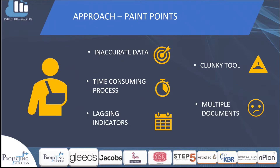Some of the pain points identified: Inaccurate data — without defined structures and closely managed fields, data is at risk of inaccuracy. Time-consuming process — manual line-by-line entry is time consuming and prone to errors, which often requires rework. Lagging indicators — outputs are lagging due to inputs not being recorded at predefined times. Clunky tool — basic Excel software which has been developed over time becomes more and more complicated to rationalize the process behind its inception. Multiple documents — reliance on multiple documents risks numerous outputs versus a single source of truth approach managed by a governing entity.